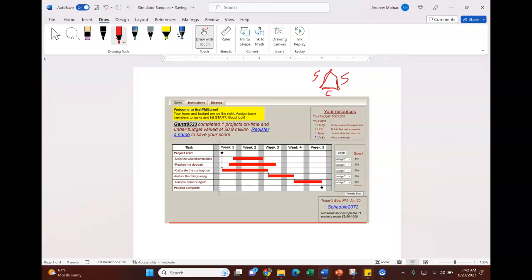The thing is, if you change any one of them, if you change cost, say your budget is cut, it will impact the schedule and the scope. You'll have to reduce scope and schedule, and you'll have to decide which scope items are reduced.